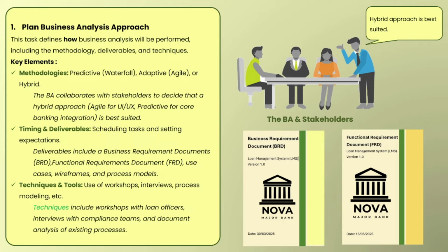FRD is created by the business analyst with the help of the business as well as the dev team. And once the FRD is approved by the business team, it is handed over to the development team, and the development team starts developing that particular software or system using the FRD. That's why these documents, FRD and BRD, are very important, because the entire project depends on them.